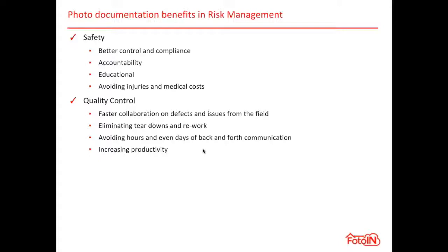We've even been able to use the tool with city inspectors. Say we want to get a pour made. We're not quite ready by the time the inspector goes home on Monday, but we really need to do the pour Tuesday. We've actually had inspectors accept photo documentation of inspection items they need to see corrected. So we found a lot of different ways to leverage these tools, not just for safety, but also for quality and to benefit our schedule as well.